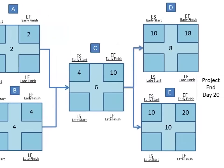We start by putting in the latest time that the two tasks that end the project can complete. Well, since the duration of the project is twenty days, then the latest that task E and D can end is the end of day twenty. This makes sense, so let's put twenty here for task D.